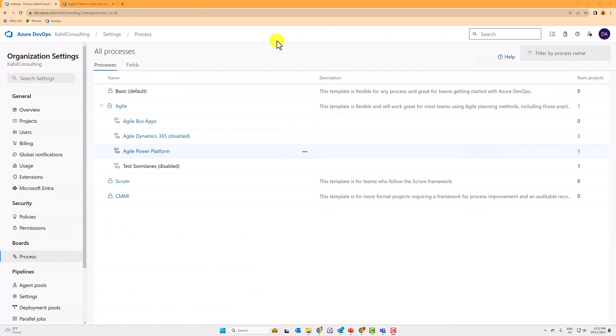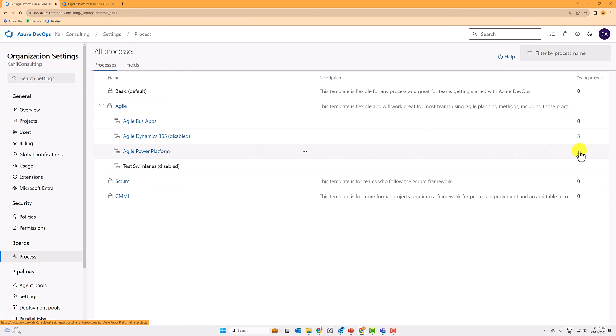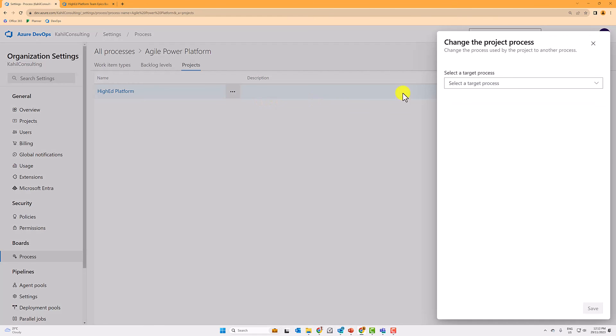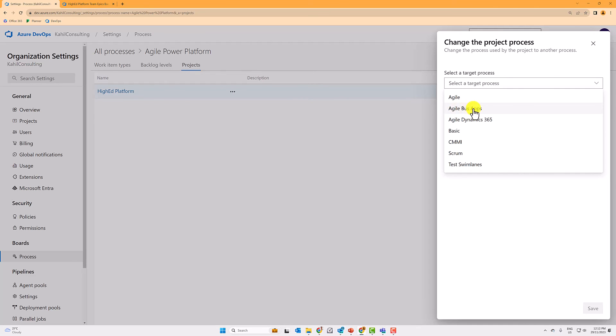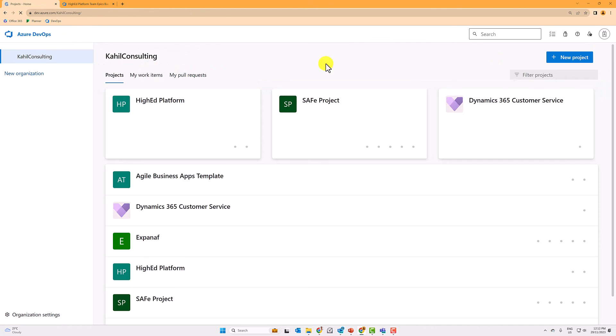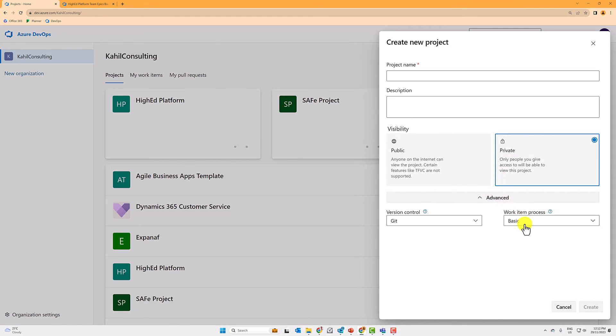Now going back to the all process screen, you can now move project. So let's say you have a team project here, so you can see the projects here, but you can effectively move project to different processes. So the one we created was called Agile BizApps. We can move my project to the tweaked one I created. And also when you start a new project, you will now have the ability to pick some of your custom processes.